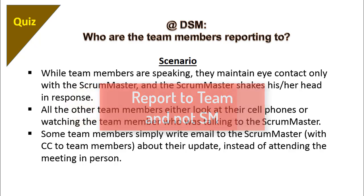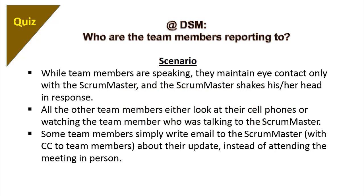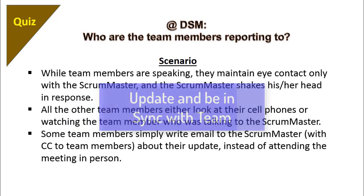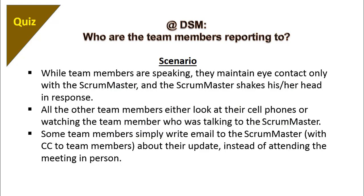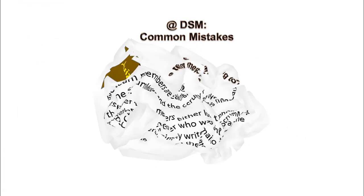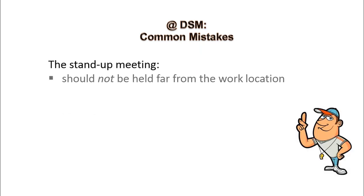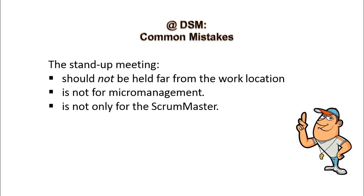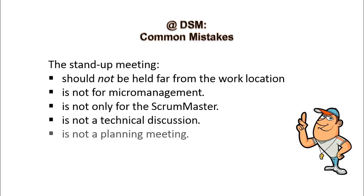The team members should not be reporting to the scrum master. They are supposed to report to the team. At DSM, the team gets to know what is happening in the project. They get to know about other information like visitors, impediments being solved, or if there is any new employee joining the team. The idea is to keep everybody in sync about the progress. The scrum master facilitates and ensures that the meeting finishes on time. The meeting should not be held far from the workstation. This meeting is not for micro management, it is not only for the scrum master, it is not a technical discussion, and it is not a planning meeting.